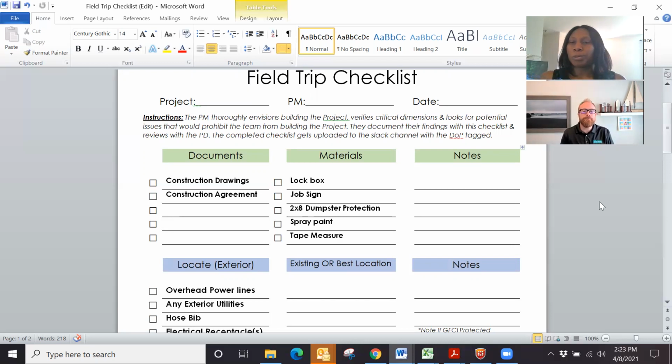Yes, so the paint that can be used, obviously it needs to be pre-mapped out with the client so they know. But sometimes when we're laying out a site and you want your different materials to be dropped in a certain location, trusses here, some sort of lumber package here, plywood here, you could draw that right onto the lawn. So when they drop it off from the material supplier, they know exactly where to put it.